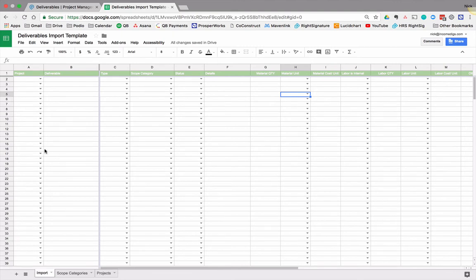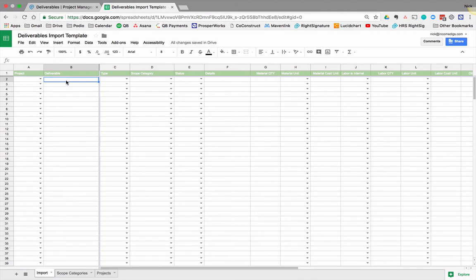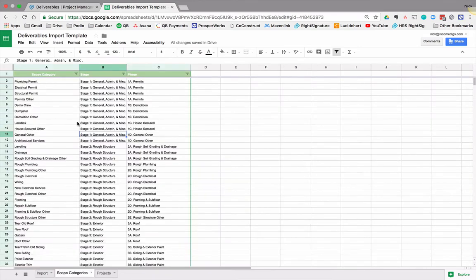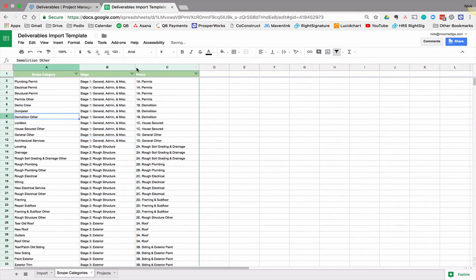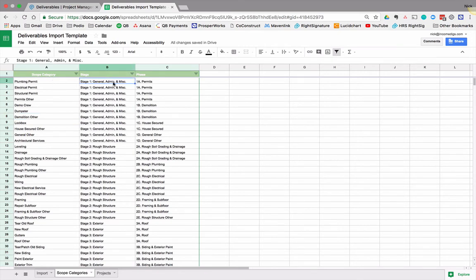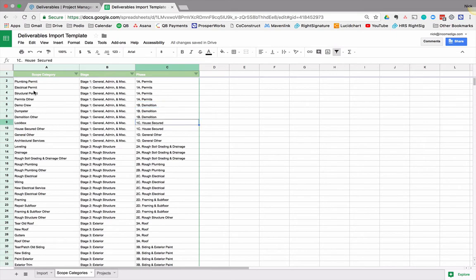So what we have here on the import is a completely blank scope of work. So it'd be really easy for me to start adding deliverables here, but it'd also be really easy for me to forget stuff, for things to fall through the cracks. So what I'd advise you to do and what I advise to this client was use your scope categories. When you get set up on your rehab project management setup, you're going to create your scope categories. Now we will provide this list to you included. You could choose to use this, but you might choose to customize it a little bit. This is the way that I manage my projects. We have a stage, a phase, and then a scope category.